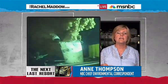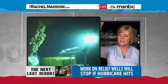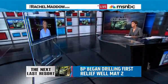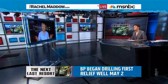Now, the good news about the first relief well is that BP says it's about 10 days ahead of schedule. They've done all the vertical drilling, and now they're at the point where they're doing the horizontal drilling. It is about 12,000 feet down, and it has to go 18,000 feet down. So it's 10 days ahead of schedule, which is good, because if there is a tropical depression, if there is even a hint of a tropical storm or hurricane, all work will have to stop because they'll have to bring the people to shore until the storm passes.